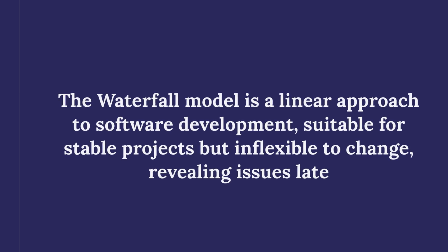The waterfall model is a linear, sequential approach to software development. Each stage must be completed before moving to the next. It's suitable for projects with stable requirements. Advantages include simplicity and clear deliverables. However, it's inflexible to change and may reveal issues late.